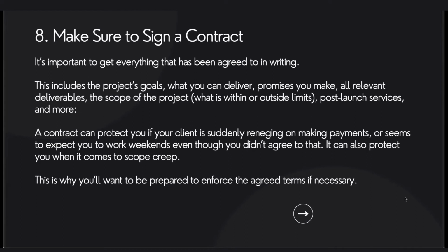Anything after final revision has to be quoted out, because it's going to depend on what your client wants, right? What do they want to add after this final revision? I have clients, I know that I've looked at some projects,